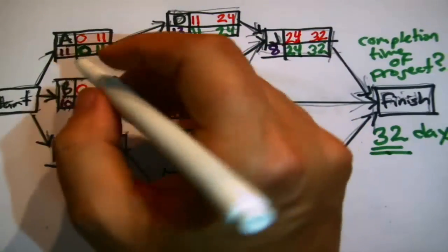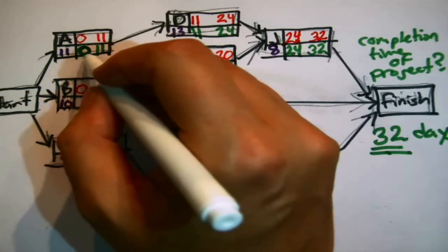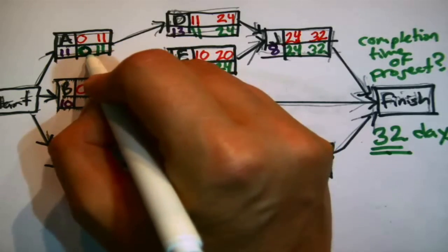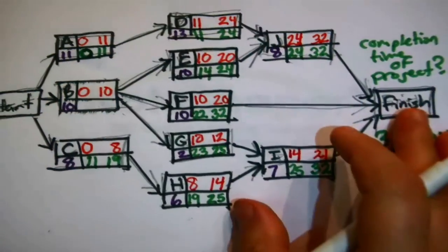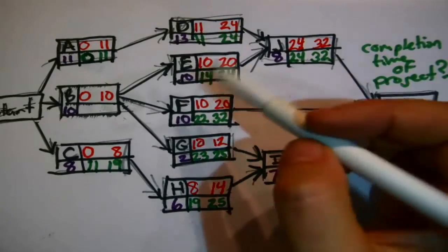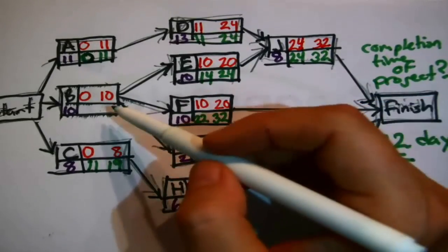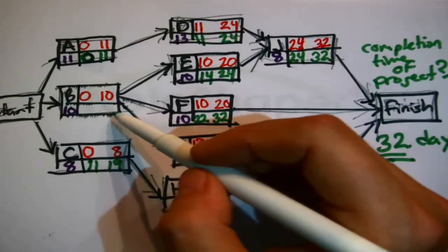Oh, I am really glad to see that. By the time you're done with this arithmetic, for somebody attached to the starting network, at least one activity has to zero out. The late start time has to be 0 as well. If it isn't, then we did something wrong.